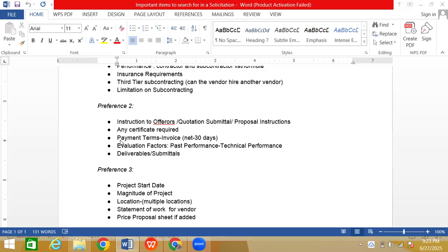Our first protocol is we ask them, can you reduce the deposit to maybe 20%, 25% from 50%? Okay. And then see what they do. In other cases, when the vendor asks you, what are your payment terms? You tell them it is net 30 days. You tell them that once work is done and it is inspected, you get paid. Okay. Now there is one more thing, that when you are negotiating the deposit, remember that you have options.